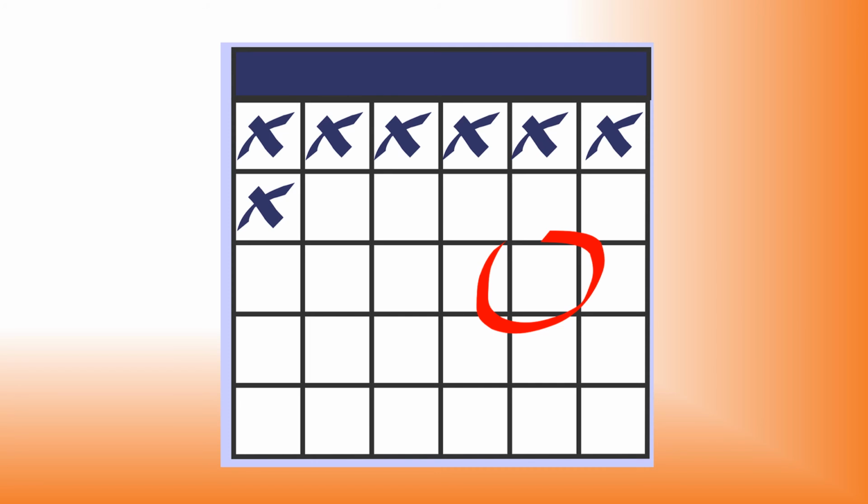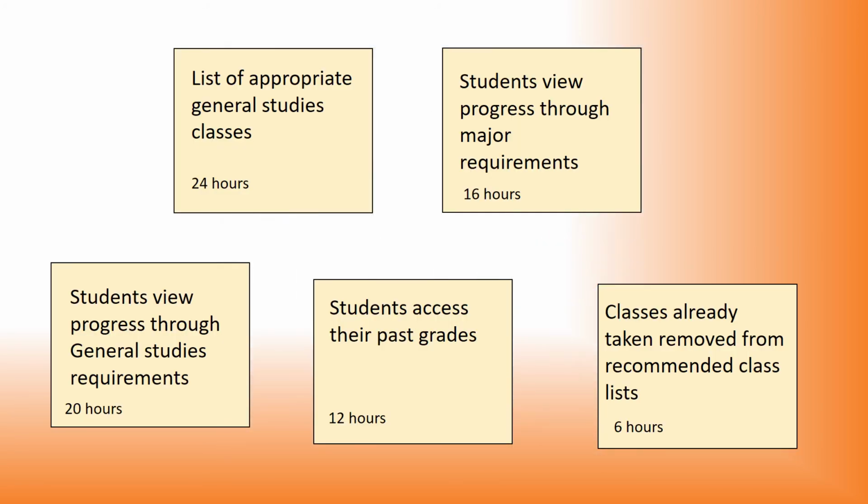They meet with the stakeholders and literally lay their cards on the table. Enrico says, "We can do about 60 hours of work yet. These are the features you wanted that we could still possibly complete in the remaining time. The amount of time they take is listed on the cards. Which ones do you want us to do?" The customers make their choices, and the team finishes the project.